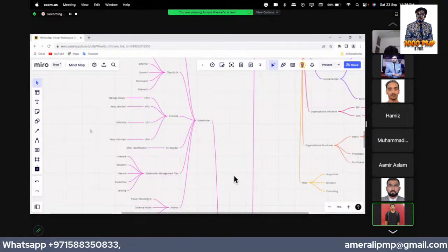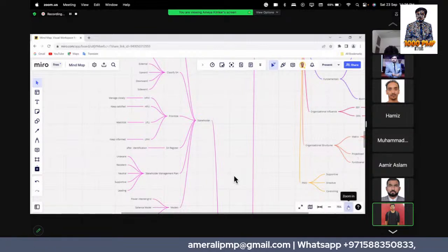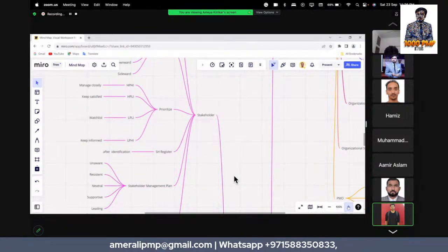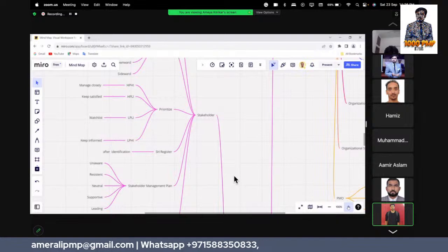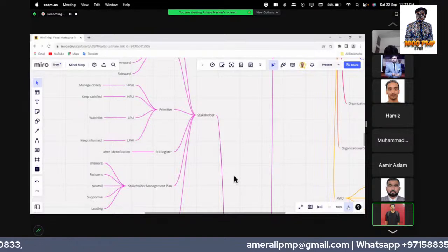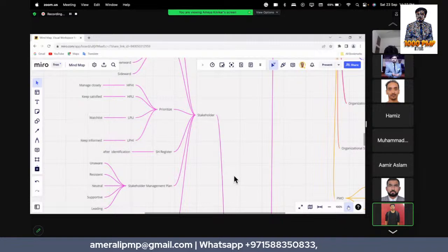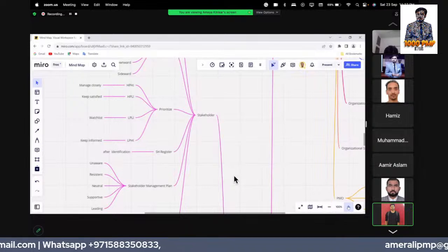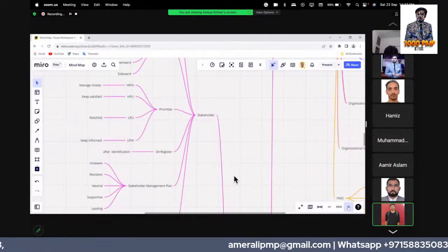Anyone who has high power and less interest, we keep satisfied. Anyone who has low power and high interest, we keep informed. They may be a competitor or media. And anyone who has low power and low interest, we call kitchen staff. We just monitor them.